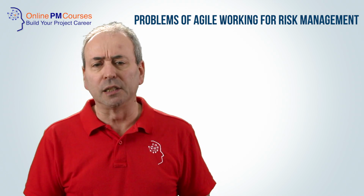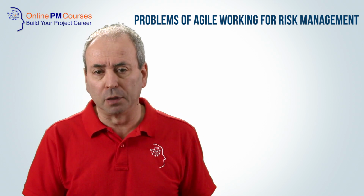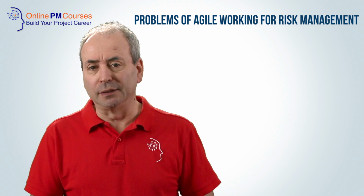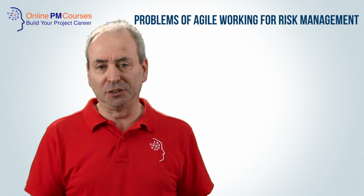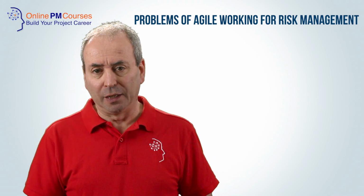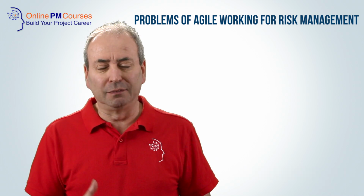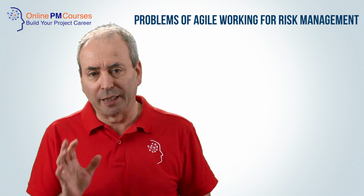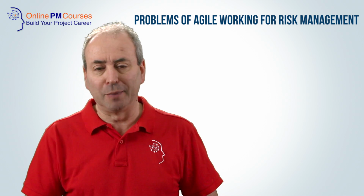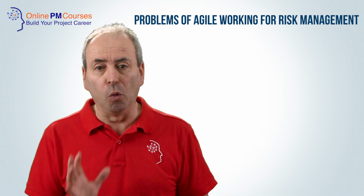Secondly, the lack of ownership, alongside all of the benefits of an agile process to risk management, can lead not just to complacency, but also to a cavalier attitude to risk. Because risk management can be so effective, by reducing the likelihood of risk, it psychologically leads us to take more risks, and therefore, ironically, by being better at managing risk, we end up increasing our risk profile and taking more and bigger chances.